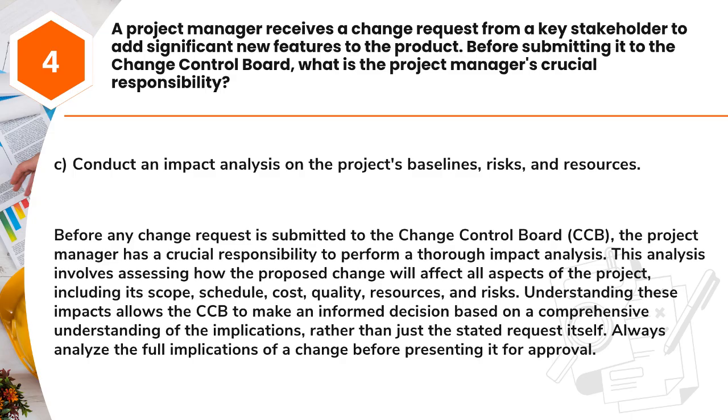quality, resources, and risks. Understanding these impacts allows the CCB to make an informed decision based on a comprehensive understanding of the implications, rather than just the stated request itself. Always analyze the full implications of a change before presenting it for approval.